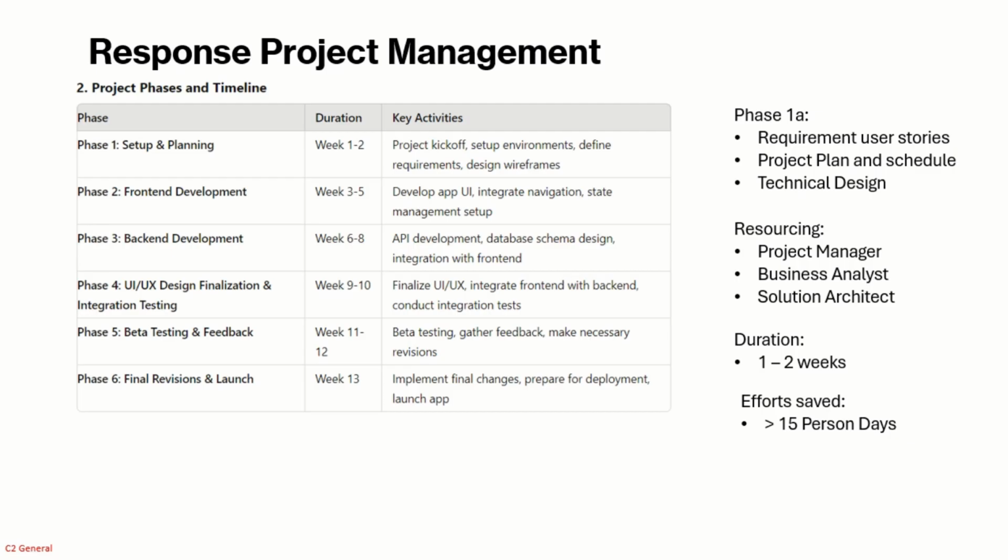Having completed the technical design, let's track where we are in terms of our project plan. The first phase of our project was setup and planning, which involved project kickoff, setting up the environments, defining the requirements, and designing the wireframes. Out of this phase one, the activities that we have completed, let's call it phase 1A, are that we have completed the requirement user stories, the project plan and schedule, and we have arrived at the technical design.